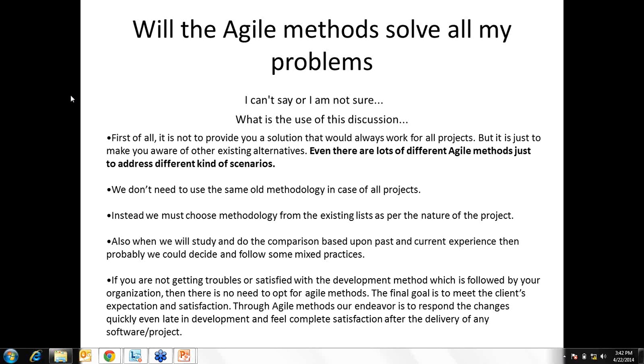But in case of agile, it will go hand in hand. So in one iteration, it will include your analysis, design, requirement fine tuning or understanding, and implementation, that is coding or construction, whatever you can say, and testing. All are together in one iteration. So that is a basic difference. And at the end, each iteration will deliver you working software. If you look at it from the output side, in waterfall each phase will deliver only some documents. Only in the construction phase will it deliver a document plus the application or the product.